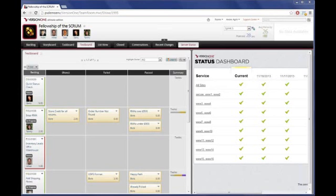symbolize. So if it's a sales app, pick a particular type of sales person that you have a lot of, the new sales guy or the top 10 seller, and do the persona, figure out what they need, put something in, and then start engaging with those people to see if you got it right. If you got it right, then either go on to the second persona with your next major sprint, or start going deeper with that existing persona if you've got a lot of them in your organization, or they make a significant impact to the business bottom line.